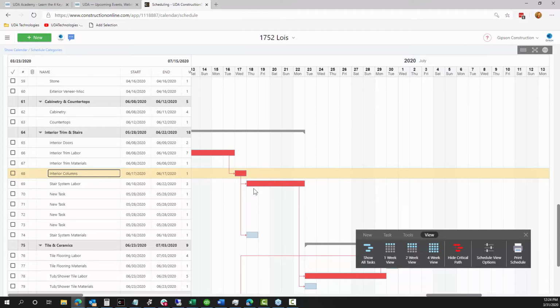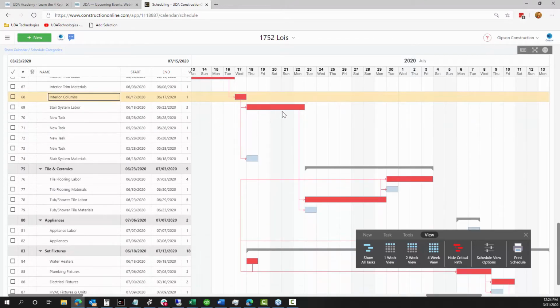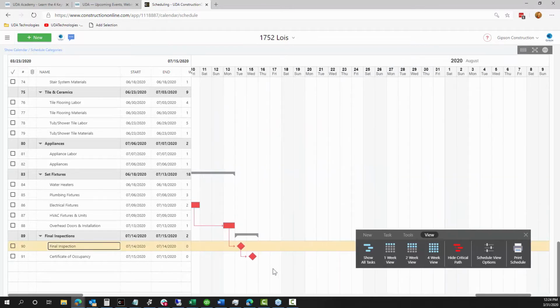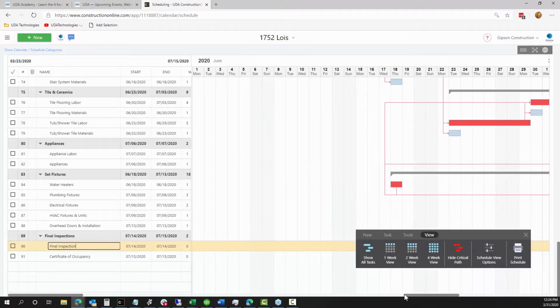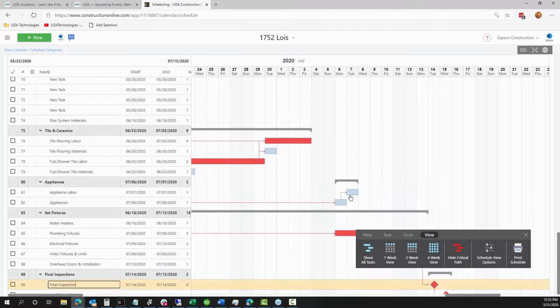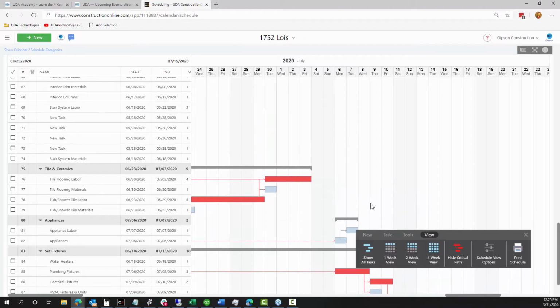the finish date of your schedule, whereas there are many items throughout your schedule that are going to be more critical. A delay here for something that's on your critical path is usually going to translate into a net delay for the end date of your project. Yeah, and that's really the key to using a critical path. It really does tell you which items in our schedule are critical, which items can't be delayed, or if there is going to be a delay impacting those items, what can we do to try and recoup or catch back up to our initial schedule projection, right? I don't think that I've worked with a client who has ever run 100% perfectly on-time jobs in their entire career. There's always going to be delays, right?